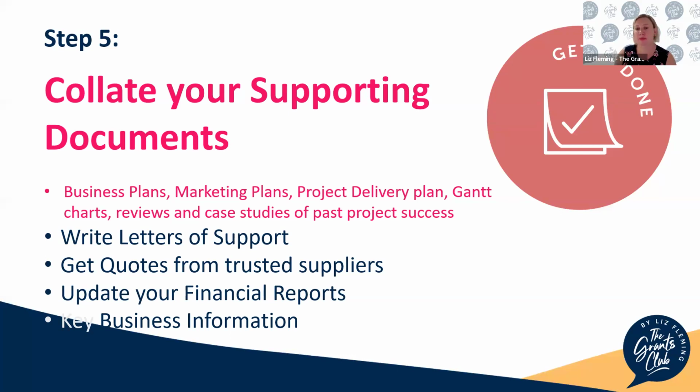Quotes from trusted suppliers. Now, this is what I talk about being grants ready and building those relationships with your suppliers. So you can ring up and say, hey, look, can I have a quote for this? Or you've already previously discussed what that project might look like. Obviously, some suppliers do require a 7-day period to get their quotes done, and sometimes that's too long. So I implore you to think about now, what are these possible projects that could happen in the future? Who do we need to go and get involved? How can we go and get a quote or go and have a discussion around, is it going to be $5,000? Is it going to be $10,000? So that we have a bit of a gauge of what kind of grant levels we are even looking at and applying for.